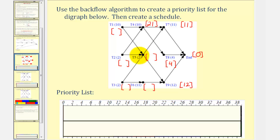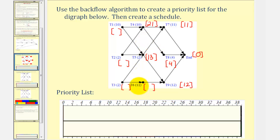Looking at task five using this path, the critical time would be eleven hours plus two hours, or thirteen hours. Going down to task six, the critical time would be twelve hours plus eleven hours, or twenty-three hours.